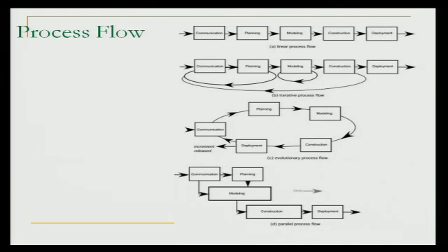Now you have to be very careful about that. You want to be careful that your prototype, which may start off as a throwaway prototype, doesn't change into an evolutionary prototype, because you may skip some steps and you may end up with some poor quality. So you have to make that decision consciously, whether you're going to evolve a prototype or throw it away and start all over.